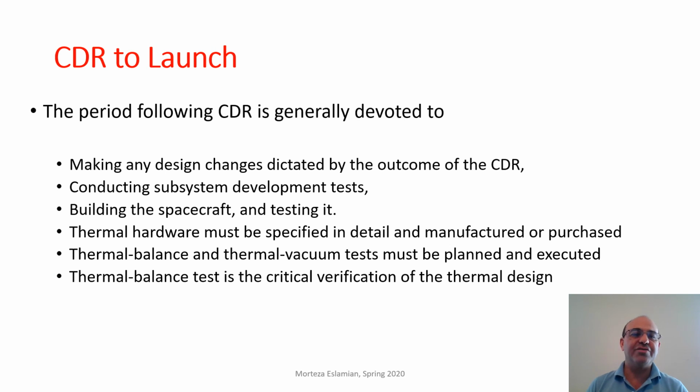So from the critical design review to launch, this period is generally devoted to making any design changes dictated by the outcome of the critical design review, again between the customer and the contractor, conducting subsystem development tests.